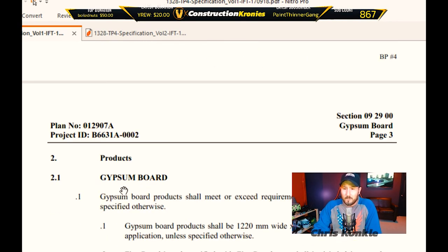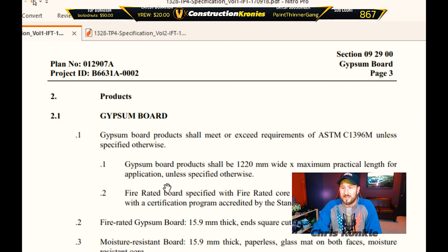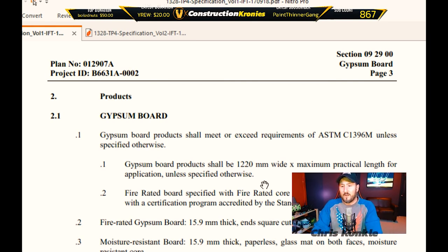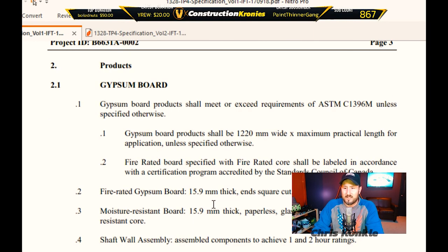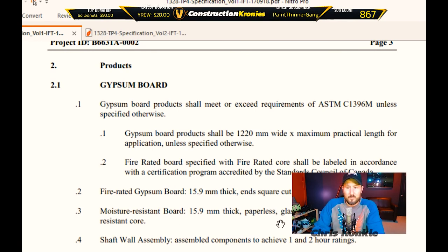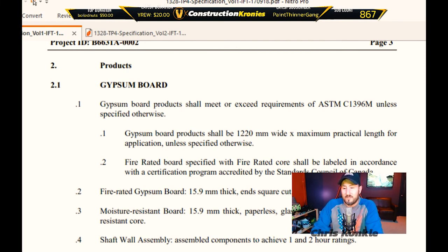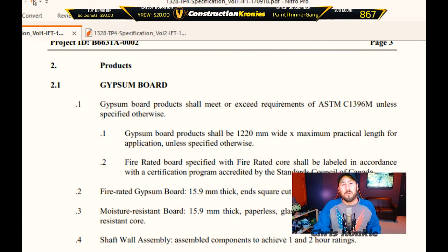The gypsum board section will tell you exactly what types of drywall you'll need — of course four feet wide, and the heights will be specified as per the drawings. The fire-rated board is type X, five-eighths; moisture-resistance board is also five-eighths, paperless glass mat on both faces. You've got to know the type of board you're pricing. Shaft wall assembly base-of-wall foam filler is specified in section 0792 — go back and check that section to make sure it's not required everywhere, because in a big building caulking the bottoms of all the walls is an additional cost that can really add up.